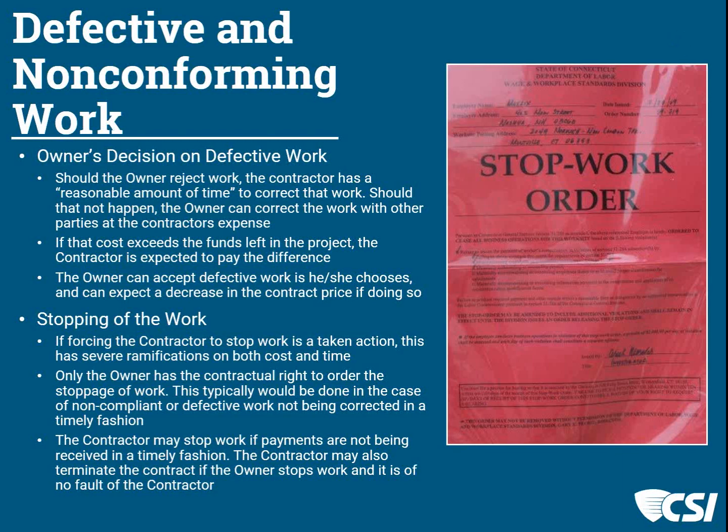Now, the contractor has a right to also stop work if they're not being paid in a timely fashion. And they may have, which are all outlined in their construction contract, opportunities to terminate if the owner is not paying them, and that is through no fault of the contractor. So they too can stop work if they find themselves in that predicament.